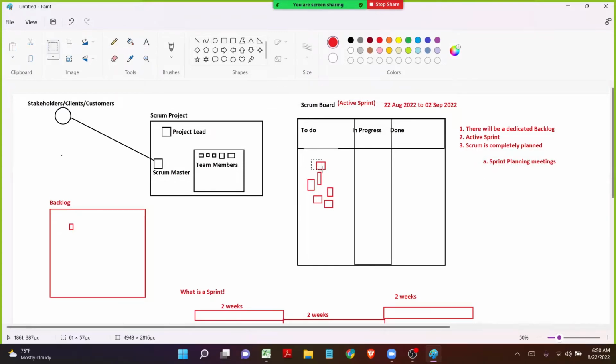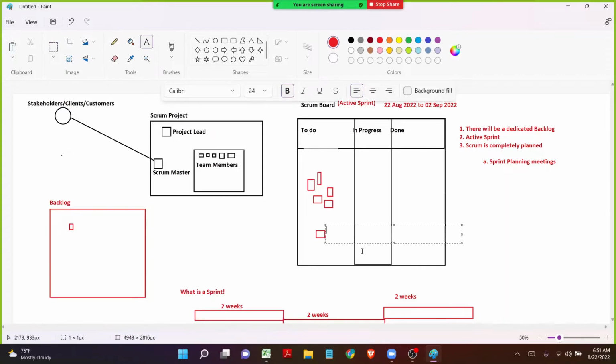Alright, he will open one of the issues, and we clearly know an issue will have summary, description, and a few other fields where the data will be there, right? So each issue will have a clear picture of what work needs to be done, and then he will explain what work needs to be done for that particular week, and then he will pick one of the team members, and that particular team member will give some approximate time. Maybe I will take some 3 days of time to complete this particular issue.